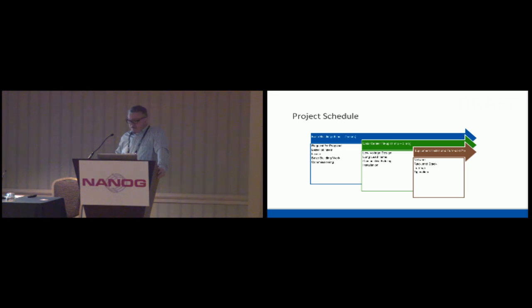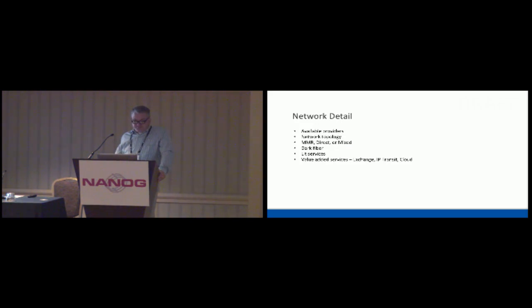And you have your rack and stack, you have your turn-up, and you have your operations. That turn-up needs to be closely correlated with the original commissioning that was done as part of the base building build-out, as does the intermediate build, so that everything matches up and you don't have any issues. As I said, network detail is very important.